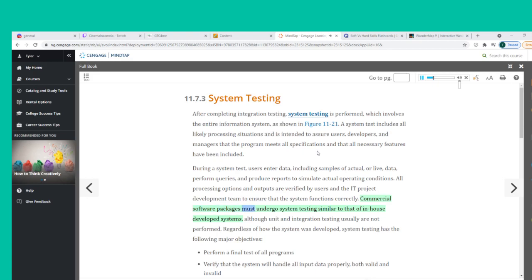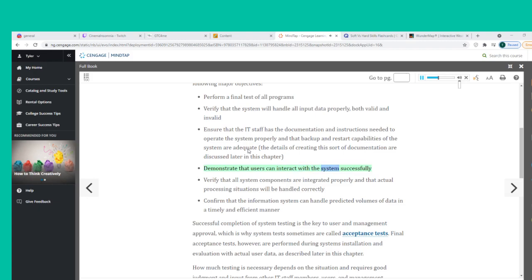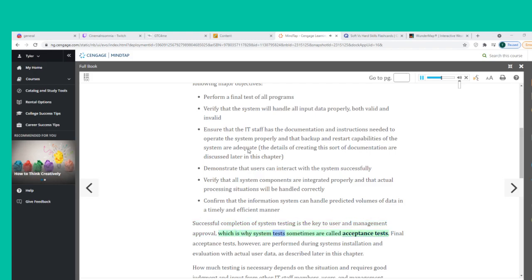Commercial software packages must undergo system testing similar to that of in-house developed systems. Regardless of how the system was developed, system testing has major objectives: perform a final test of all programs; verify the system handles all input data properly; ensure the IT staff has the documentation needed to operate the system properly; demonstrate that users can interact with the system successfully; verify all system components are integrated properly; and confirm the system can handle predicted data volumes. Successful completion of system testing is the key to user and management approval, which is why system tests are sometimes called acceptance tests.